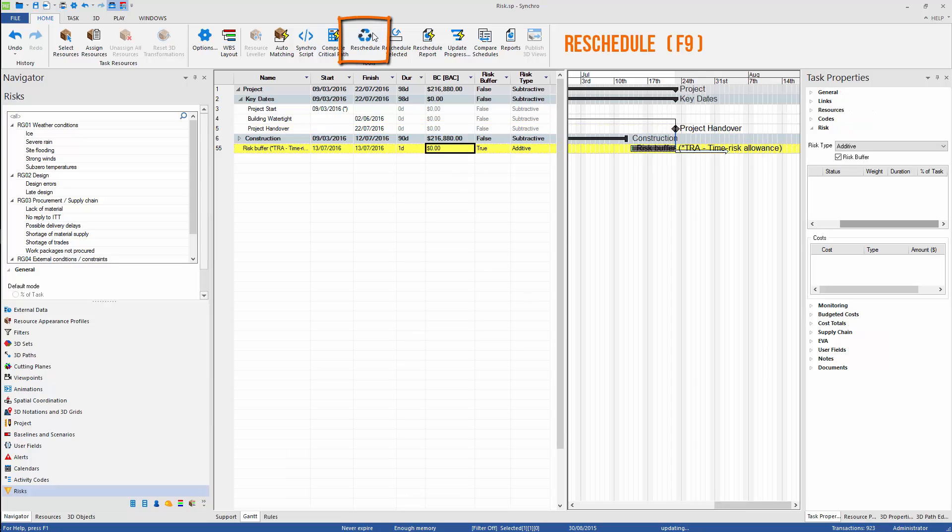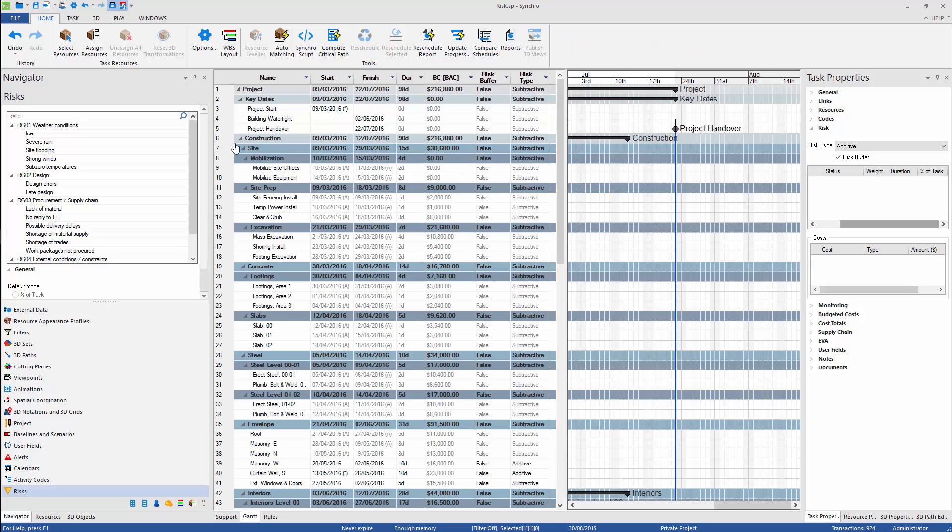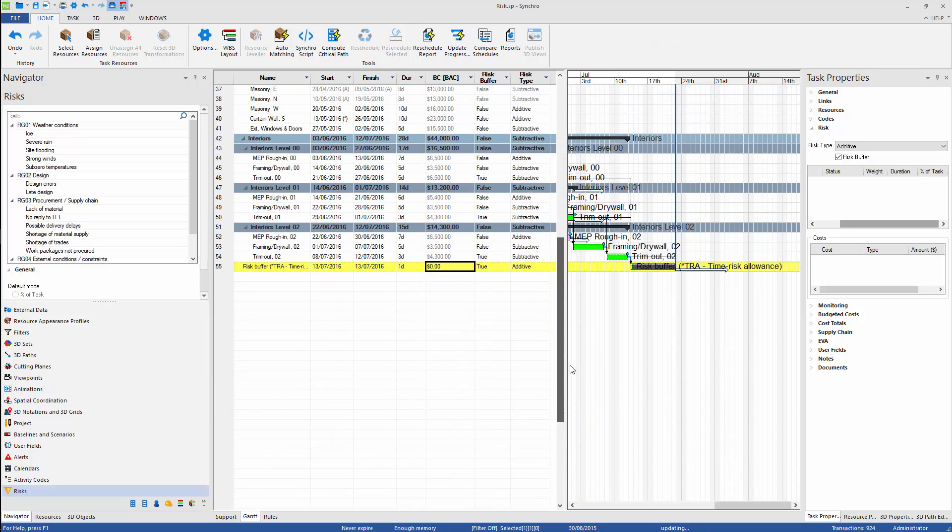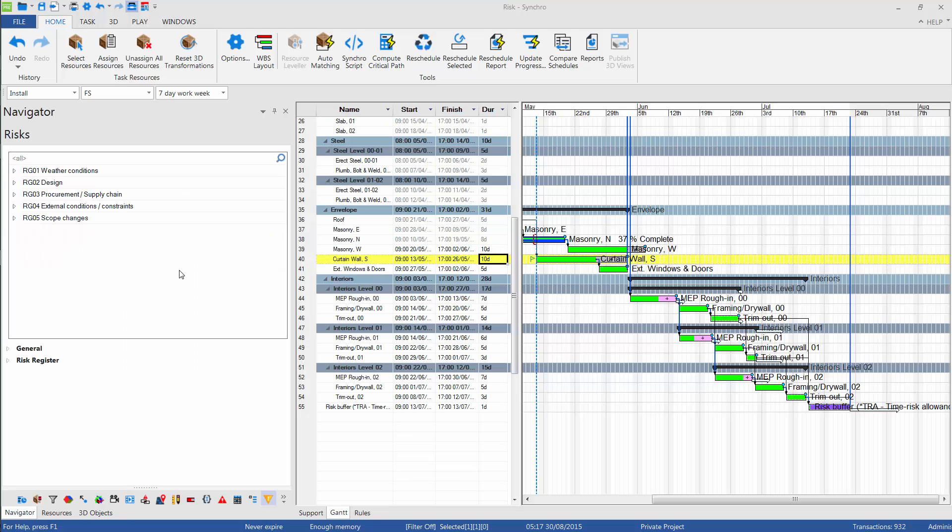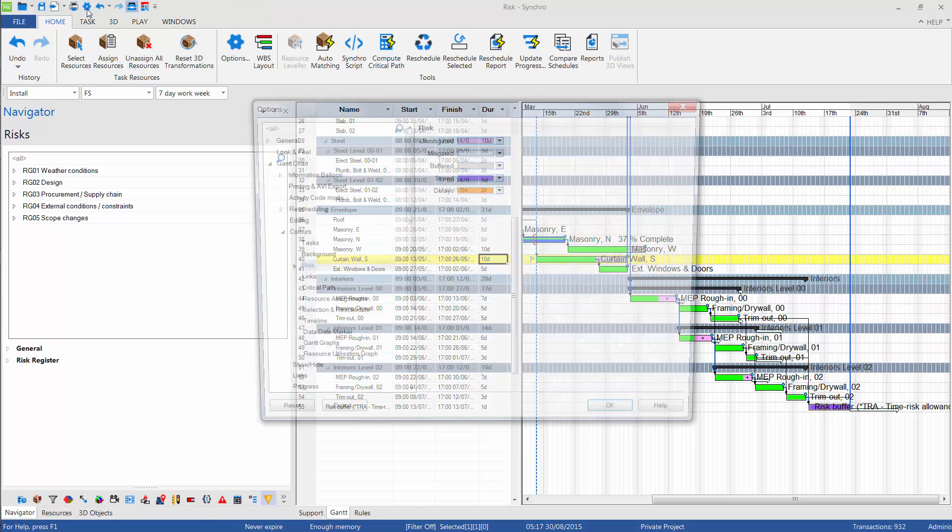Once again, we need to remember to reschedule our program after each change. We can change colors of risk buffers and risk indicators in Synchro options.